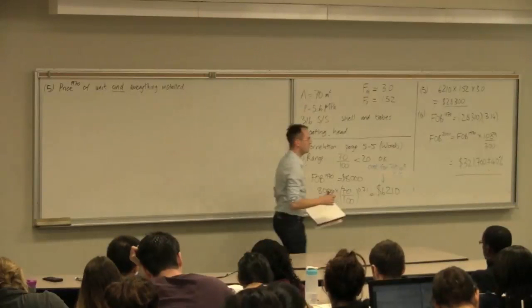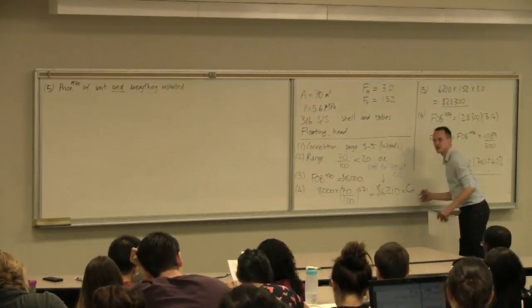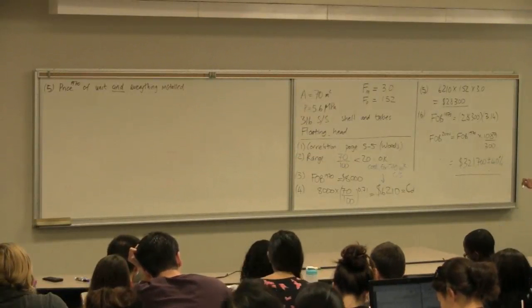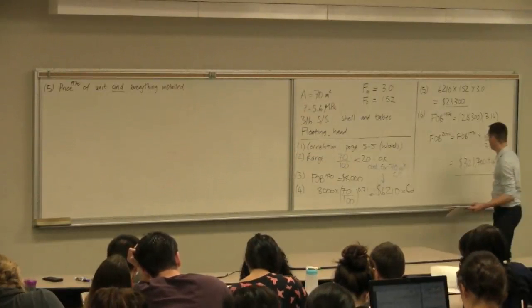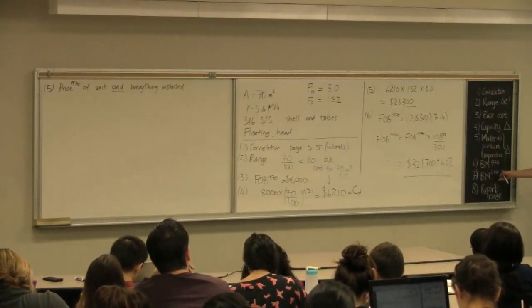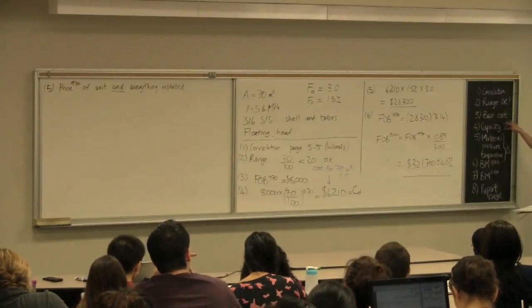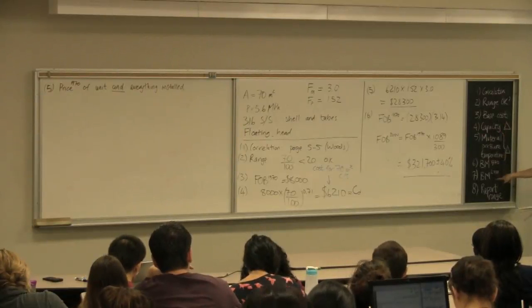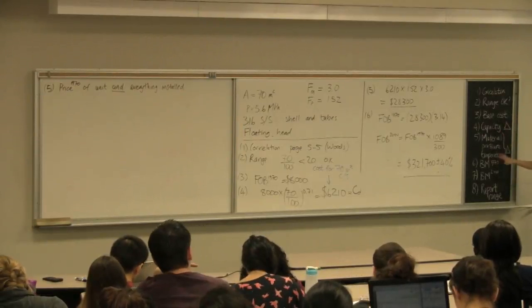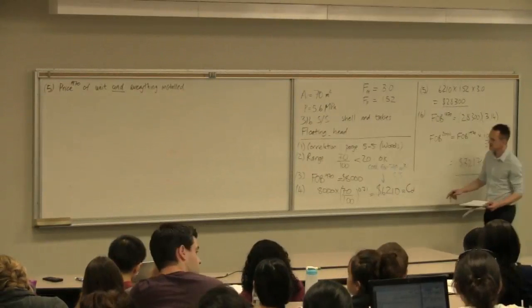What I'm going to do for convenience is call this dollar figure that we landed up here C subscript 0. So this is our base cost, C0, and it's in 1970 dollars. Notice I'll always leave the inflation for the very last step. That's my preference. In some of the slides, Dr. Marlin tends to inflate up over here and then work in 2000 dollars all the way onwards. It's immaterial. I prefer just to put all the inflation complexity at the end. So for now, we're working in 1970 dollars.